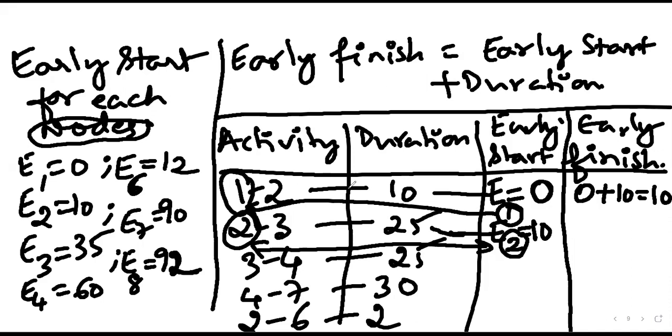If there are any doubts, you can ask. If there are no doubts, just tell me what is the answer for the early finish of the same activity. Early finish, again it is the same: early start plus the duration.